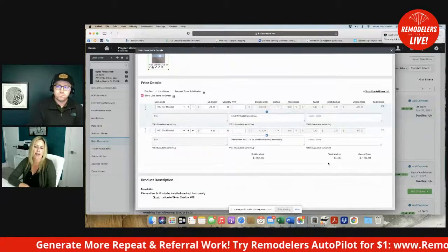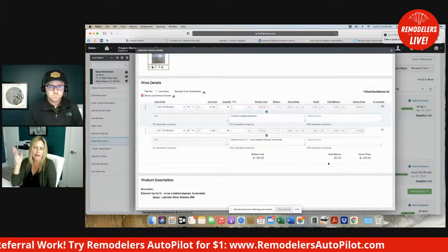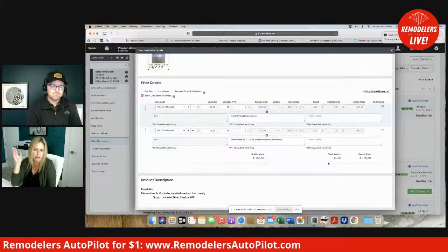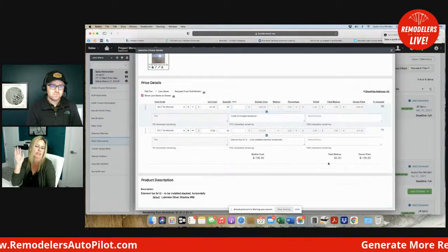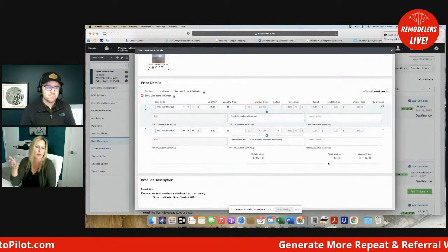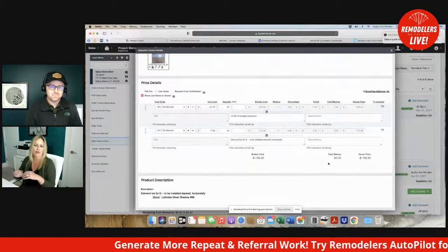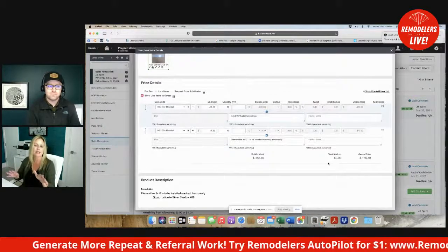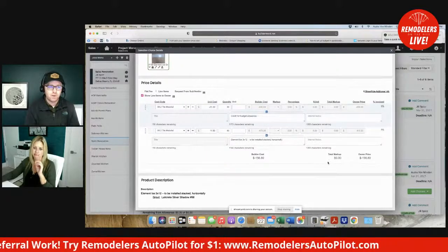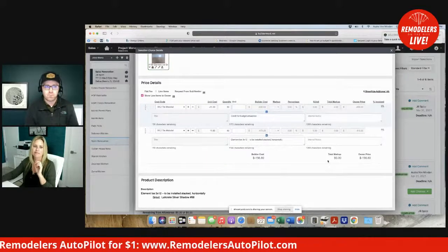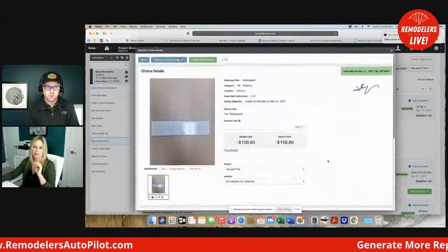And I used to always, things like this, what color grout? I don't know. We'll figure it out in the field. I can't tell you how many jobs I've regrouted because either I didn't like what the installer picked, or the client didn't like it, or they told me something different and I forgot. They like to call me when I'm driving down 95 and tell me important details like paint colors and grout colors, and this just eliminates it. And that was super interesting. I used to say, I don't know, we'll figure it out when we get there. But now I've changed my process and I'm tenacious with it, and we're going to get that figured out before the hammers arrive on the job site.